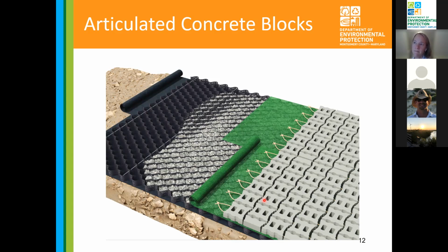That's the question. Yeah, no, the blocks themselves, we have specifications, and there's really only 2 manufacturers that make these products. So those products meet these design specifications. So it's a much, much better quality than you would get with any type of sidewalk concrete. The contractor that's going to be installing these, they're just going to buy them from the manufacturer, and they're just responsible for laying them in place. So they're coming directly from the manufacturer, where they have strict quality controls. Great, thank you. That's what we're looking for.